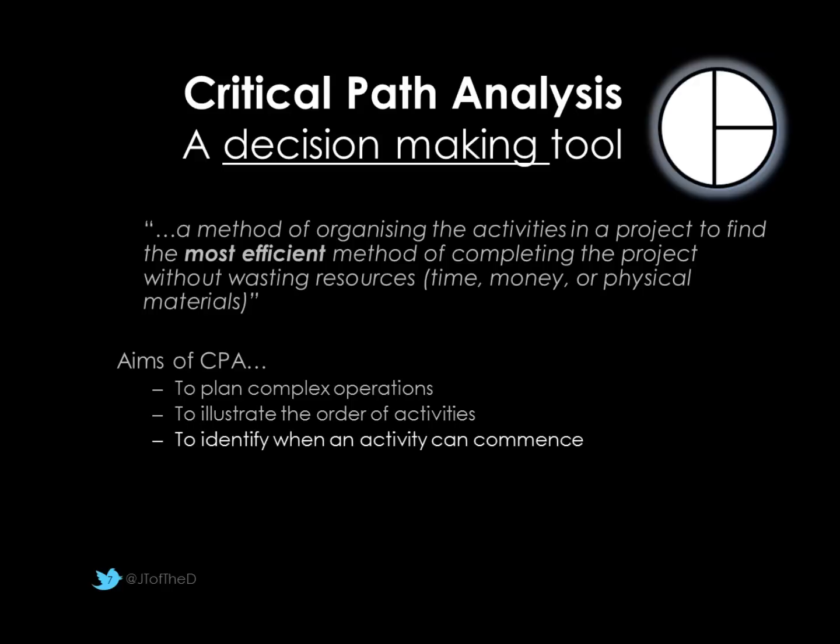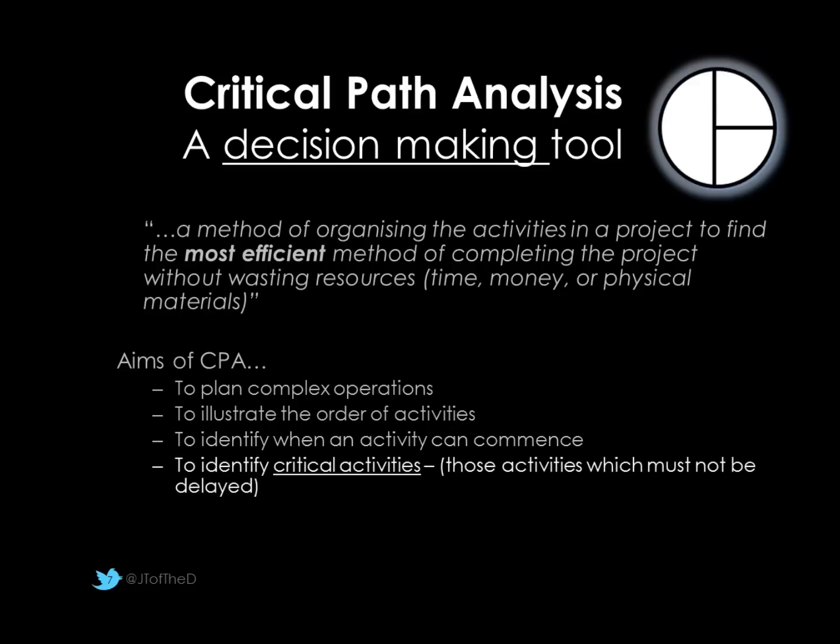To identify when we can start something, so when something else finishes. So in my example, we could actually wait for 3 people to arrive. 6:55 was the last person, so therefore that's when we could then go into the stadium. So allowing for that allows us to know when we can continue with something else. It also tells us which of those activities is critical. So my friends coming from Stanmore and Watford, they had a little bit of spare time.